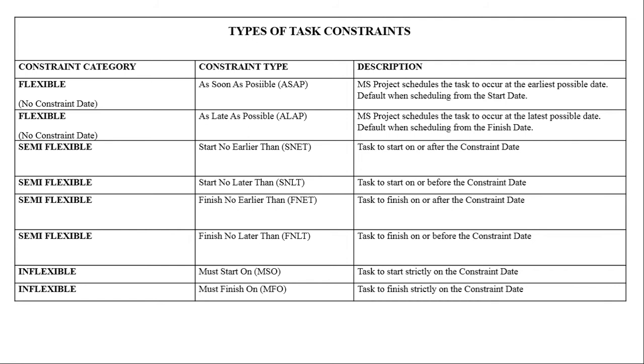This is in a case where it is possible to keep the product we are making, even for days before the transportation is ready. So we are saying you can finish it earlier, but the latest it must finish is Monday, because after Monday there is no more transportation. Or in the case of our scheduling, if it finishes after Monday, it causes the rest of the tasks to be delayed. So at the end of the day, you push the finish date later than what you initially scheduled.